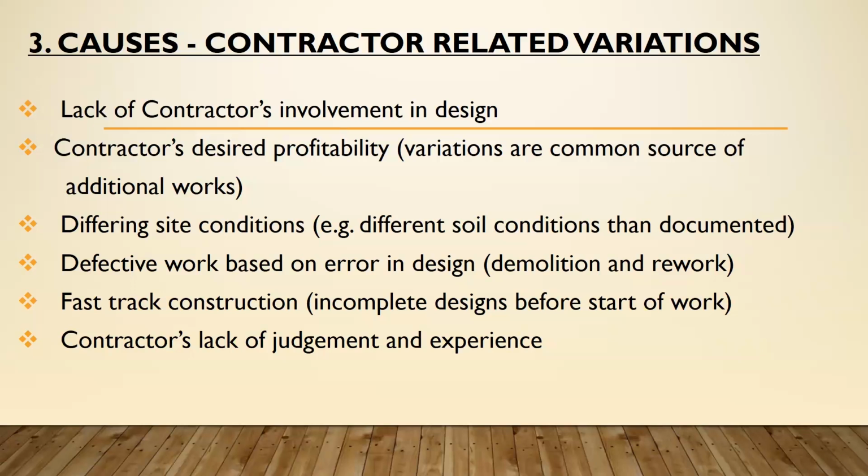We also have fast tracking construction, where we have incomplete design for the start of work. It may also bring about variation, and the contractor's lack of judgment and experience. So when an inexperienced contractor is given such a project where the designs and other parameters for the works are not ready, it may bring about a lot of errors in construction, and then other costs are incurred.